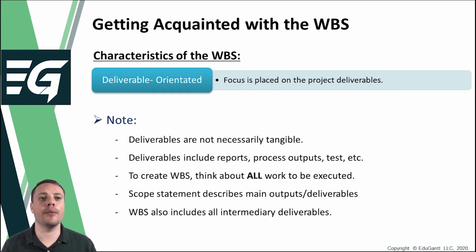In essence, the WBS serves to significantly expand on the details documented in the scope statement. The scope statement describes the main outputs or deliverables, while the WBS breaks these deliverables down into smaller components and in the process defines all the intermediary deliverables such as reports, drawings, and specifications that support and facilitate the creation of the main deliverables listed in the scope statement.